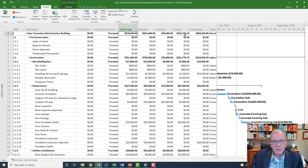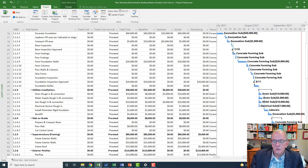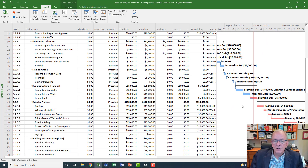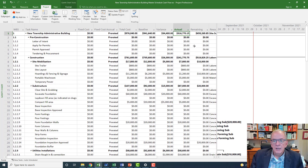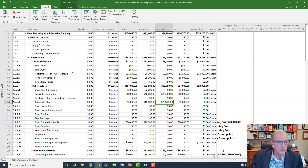We have a variance of $34,400 from what we planned versus what's happened so far. We've actually spent $316,770.15 of that overall amount, and what's remaining after the status date is $659,269 cost-wise. We can scroll up and down to see where the variances are, or we can go to our resource sheet.